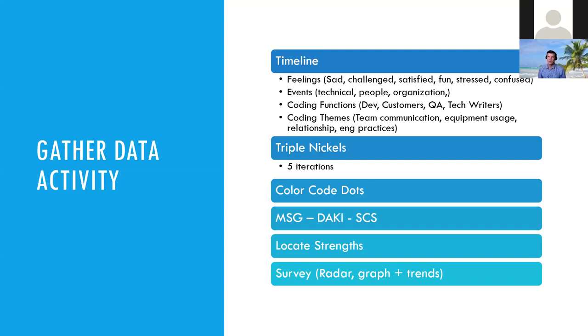Color dots. This is very helpful, because it speeds up the discussion. Like you say, everybody needs to figure out only two ideas, and you have three dots to use, and that way you can easily prioritize and figure out what will be handled. Remember that, and I'll be repeating it every three slides: the retrospective is only to deal with the most important things. You don't need really more than three or four.